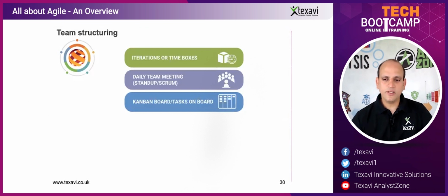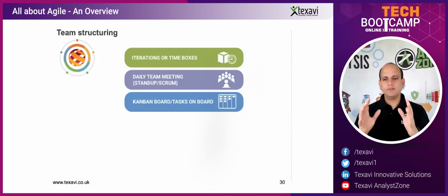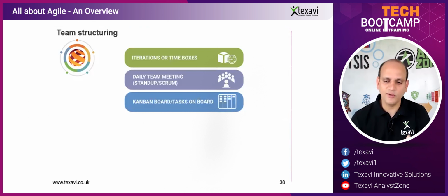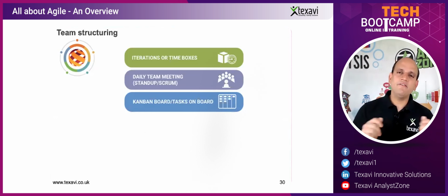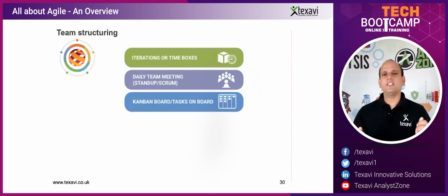So it gives you a picture of how many tasks you have. 10? Or is it 9? Okay, let's say we've got 9 tasks in total. Out of the 9 tasks, we've got 3 that are still not touched, 3 are in progress, 2 are done and developed, and 1 is deployed. It's already finished, deployed, and it's on the server, right? So you get a clear picture. These are called visual radiators, visual information radiators. Just one look at this would give pretty much every information about the status of this project.